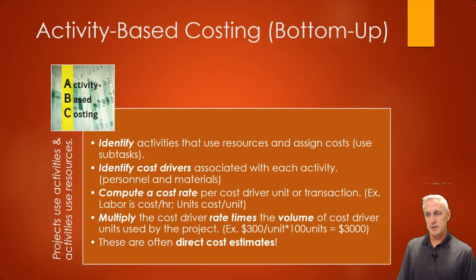Several things have to happen. When we look at all the different activities and all the resources for each activity, all those have to be identified, and we have to have some estimation of how long it's going to take for each of those. That's why it's important to look not only at the cost, but the schedule, how much time it's going to take for people to do the work, because you can't estimate the cost for any activity until you know how much time each person's going to put into each activity. Then you've got to know their rate and all those things.